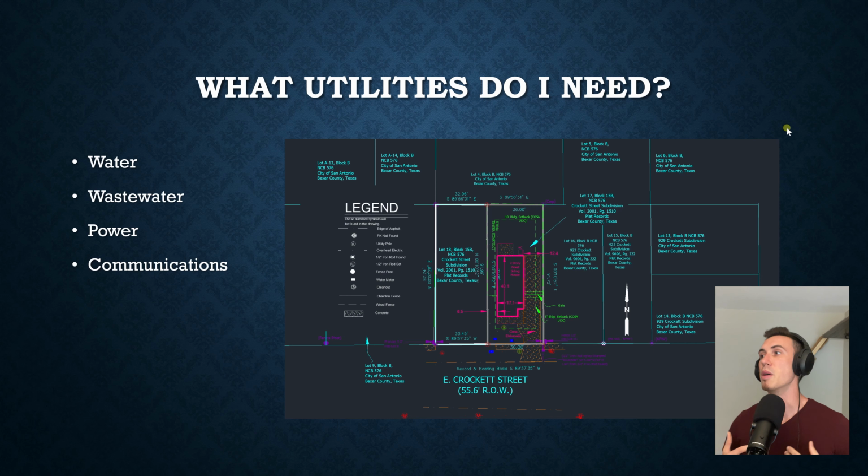But if you're going to be building somewhere farther out into the boonies, you really ought to know what you have access to and what you don't, because that's going to affect how easy it is to build, how expensive it is to build. You've now got to get all the logistics of your materials taken care of out there. You've got to do all kinds of extra stuff.